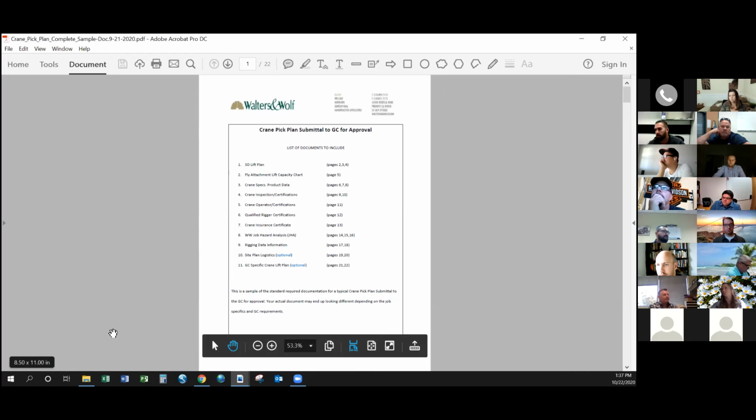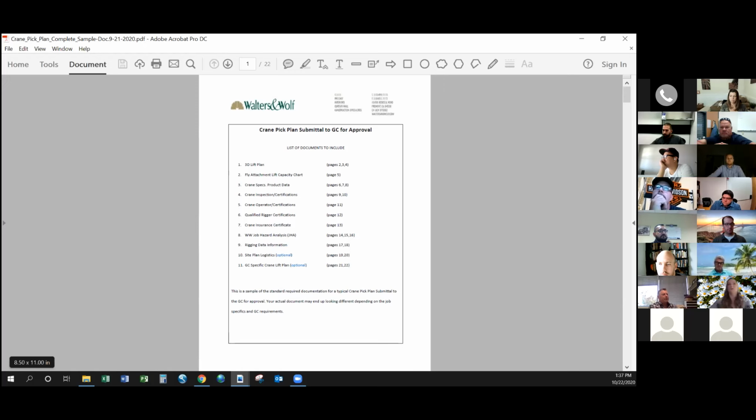I'd like to chime in on a couple of things. One, this submittal going back to the crane company: since the crane company is putting this package together, we're submitting it and getting it, hopefully, approved by the GC. We get it returned, hopefully stamped approved or approved with comments.